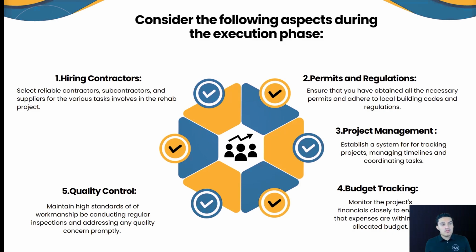By this time you should probably have interviewed at least 2 to 3 different contractors. When you interview them, of course, it's going to be based on the property. You ask them, how much do you think it's going to cost for you to rehab this property? What needs to be done in this property? And then ask them how long it's going to take.